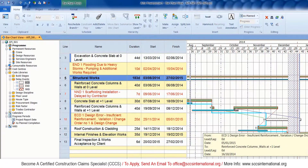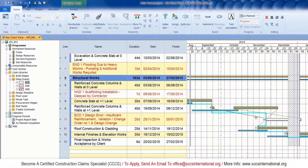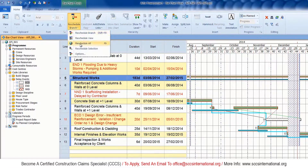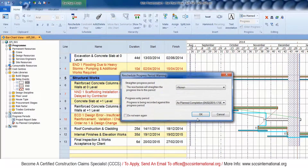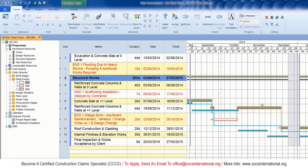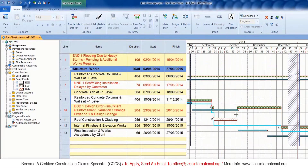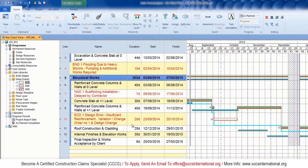The delay event has been properly inserted and is being logically linked. Once that's done, reschedule the project and you'll see that the program has been critically impacted.